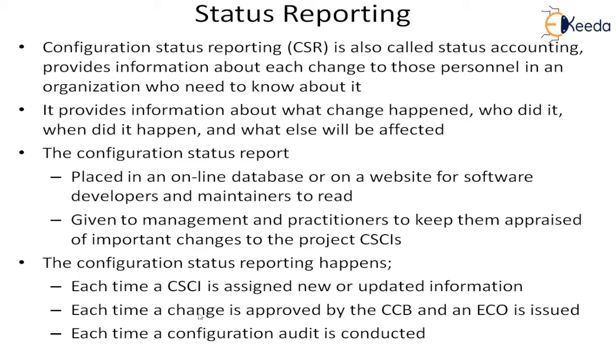So therefore a status report will be issued, because there will be a change request. It will mention which objects are getting affected. So these objects have to move to the development area for satisfying this change, this ECO. So that is why a change status report has to come. And next, it will tell you for all the objects which configuration it is, what was the last change, and when it had gone to the release. All those information will come in the status report.